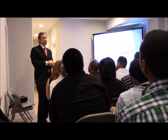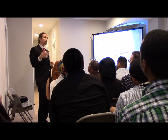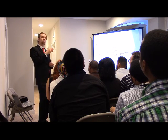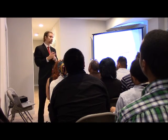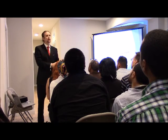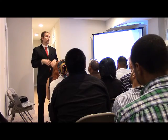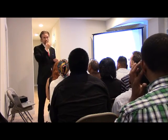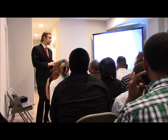What's nice about the city of Chicago is you can order all of your inspections, even if they're 6 months out. That's a great thing about Chicago versus some other cities: I can order every one of my inspections today, even if my inspection is 6 months out. So if you properly use a calendar and you properly schedule things, you don't have delays on the inspections.